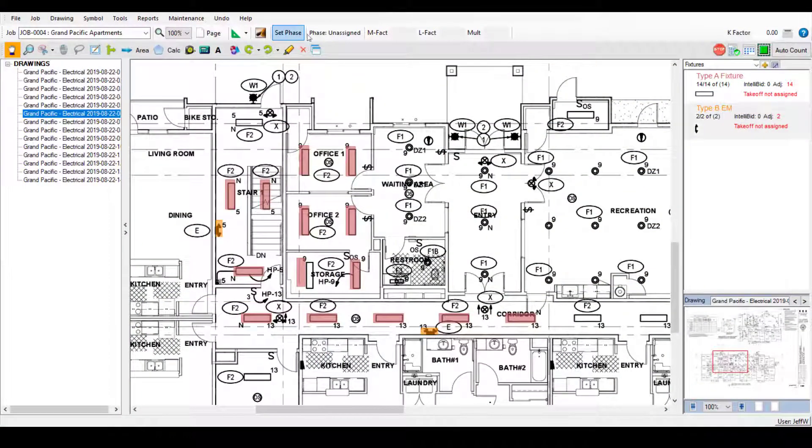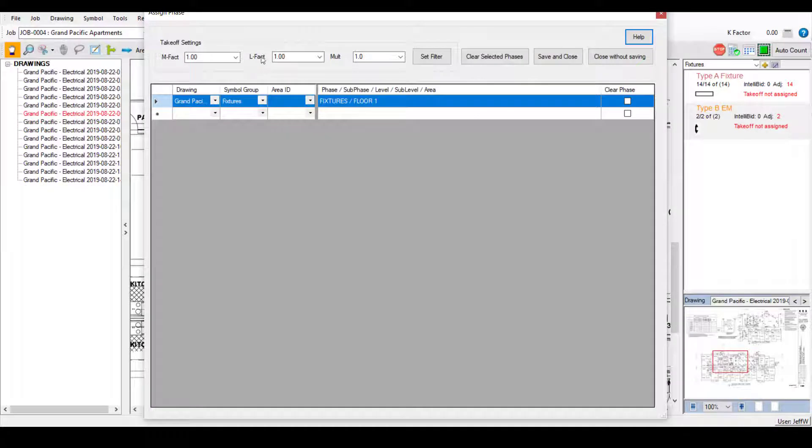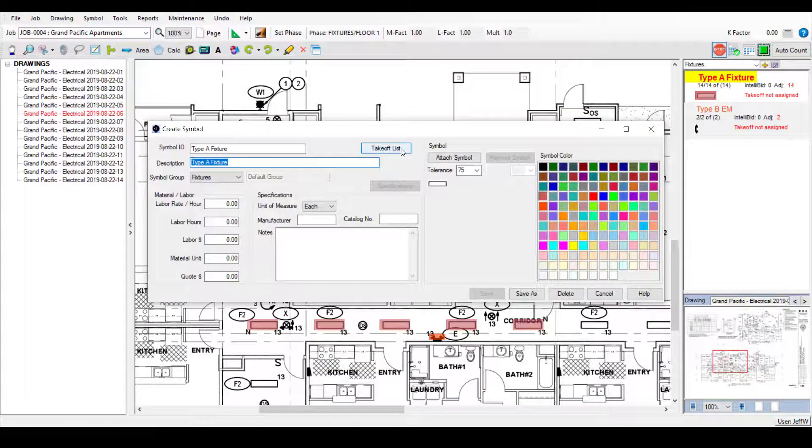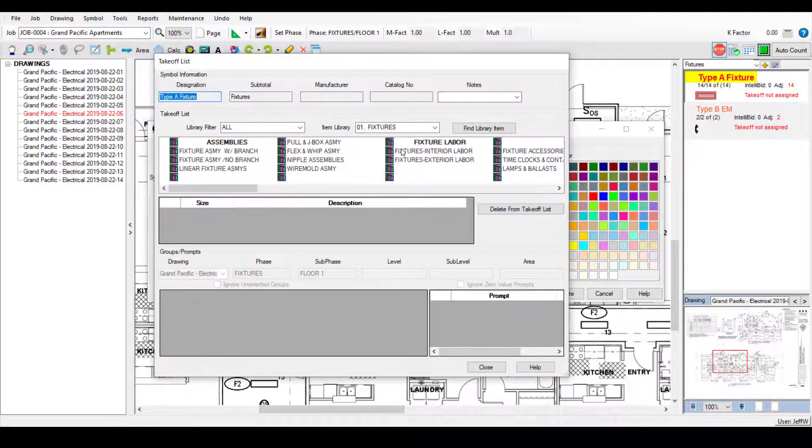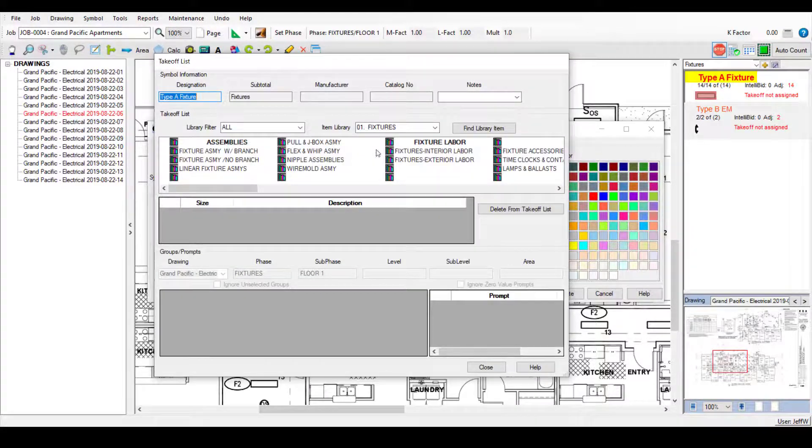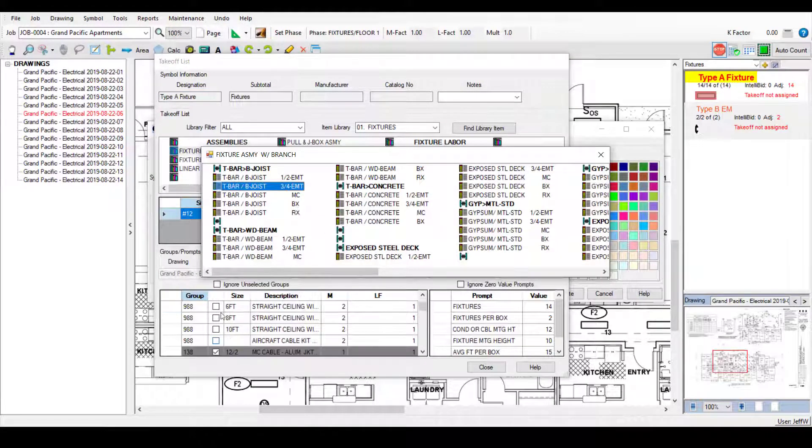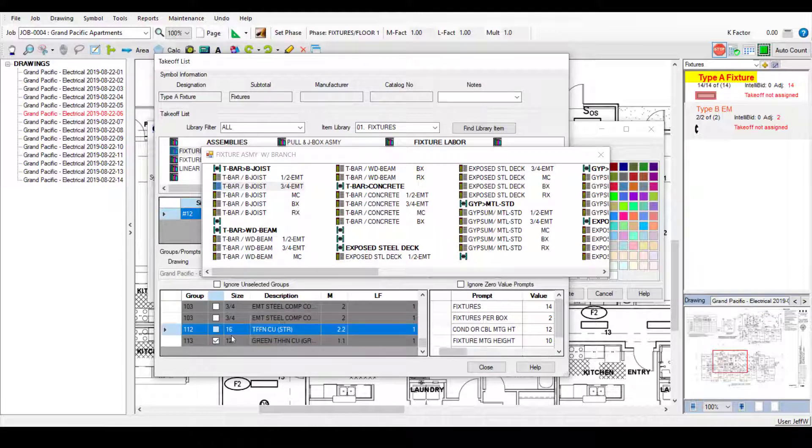SureCount groups and joins are linked to your IntelliBid estimate via the phase tree. Then you can assign materials and assemblies from IntelliBid's extensive database to your SureCount symbols and measurements.